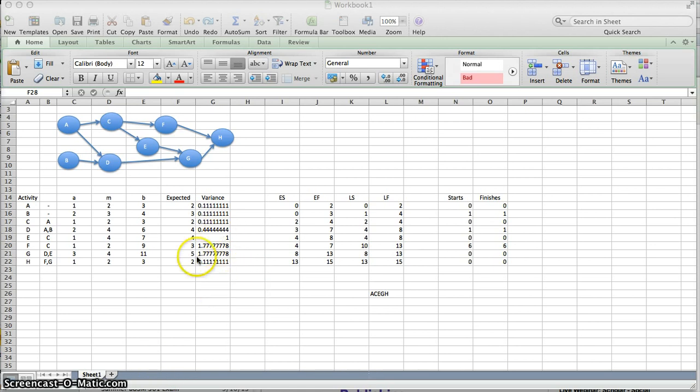One other thing you can do with PERT, because we have three estimates of time for each one of the activities and we calculated the expected time and the variance, we then can calculate the probability of finishing the project. Now, based on what we've done so far, because we did do the expected time, we can assure you that think about this way. If you have a normal distribution and we are saying we believe that we can get the project done in 15 weeks, that's basically the halfway mark. We have a 50-50 probability of finishing it. And so we've hit that majority mark.